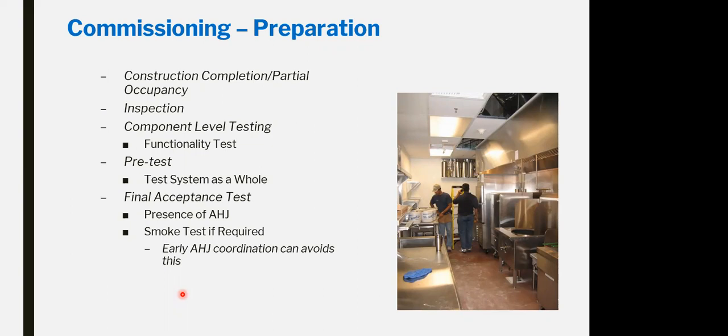It could be one of the tests to apply, called the smoke test with the smoke generators. They might ask you, sometimes they ask to make a simulation and run the smoke with the extraction, detection by the smoke detector and smoke extraction fan, and checking the fire dampers, and they see how the smoke is running. Especially for the big areas. If they are testing an office area or buildings, they are not applying it, but if it is an industrial area with a work structure and storage with an open area, they might ask for the smoke simulation with the cold smoke system.